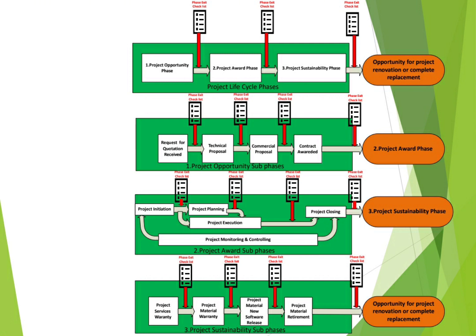You need first to request your technical lead for this project to come up with the list of activities he is going to do throughout this project, the duration of each activity, and the prerequisites to start each activity.